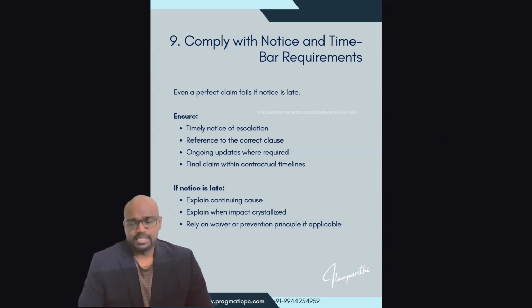If the notice is late, explain the continuing clause: that the price escalation is continuing and we are procuring in batches, so we are not able to submit the notice with a specific cost or time, and will submit the entire claim with a specific cost. Rely on waiver or prevention principle if applicable.